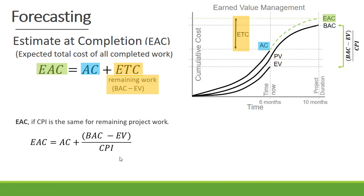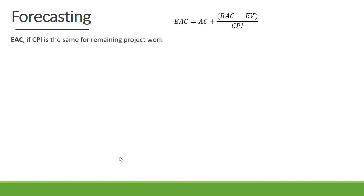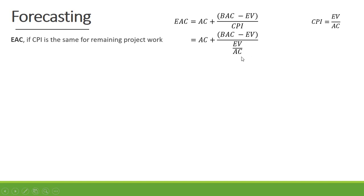When we simplify the formula we get estimate at completion equals budget at completion divided by CPI. So let's do the simplification. It is our actual cost plus budget at completion minus earned value, divided by CPI. Now the CPI is earned value divided by actual cost, so let's replace CPI with earned value divided by actual cost.